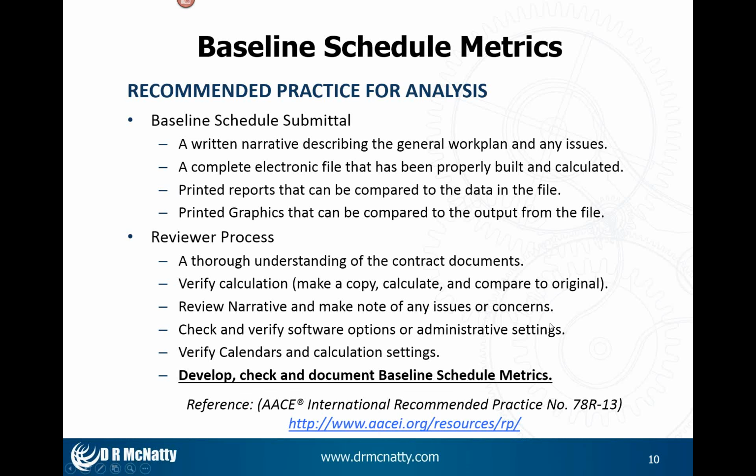So you could have created some changes in the schedule yourself without even knowing it. Once I know I've got a good copy, then I spend the time to review the narrative, make sure I have an understanding of my expectations of what I'm going to see in the schedule, make a note of any issues or concerns that I want to look for as I go through the review of the schedule.